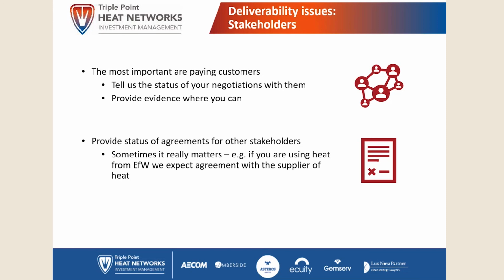If you're at construction, then we really would expect to have settled terms. At the very least, have heads of terms, and really we're looking for settled contract terms, and where possible signed contracts, but again that may not happen until during the construction phase. Again, evidence of what you're claiming is important to support the application form.